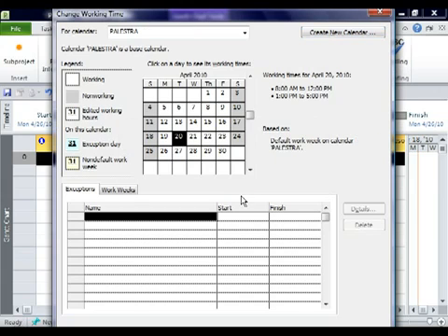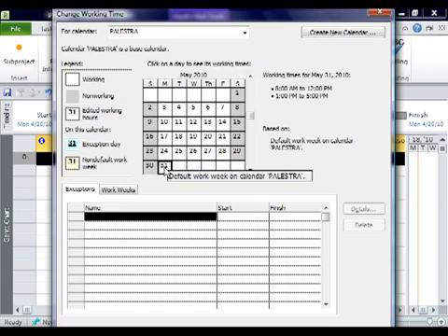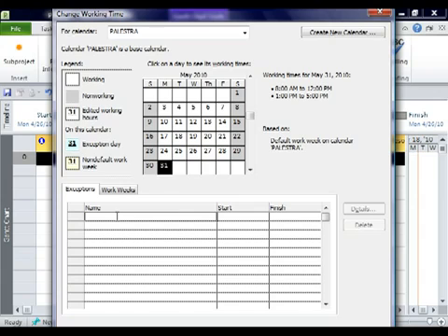I'm going to click OK, and then right now it's showing the name of the company. It's also showing the calendar for the month that we're in, and it's highlighting the actual today's date. So I need to go through here and look and see when are the next days that the company has off. I believe the 31st at this point is Memorial Day. So I'm going to come in here where it says name. I'm going to click on the date that the event is happening. And then I'm going to click down here where it says exceptions and type Memorial Day.